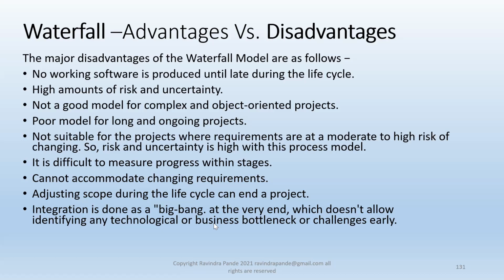Okay, for example, what type of projects use waterfall? As I discussed, wherever the requirements are fully final. Let's say you are developing a product, a new smartphone. The requirements, if they are finalized, you have already decided the strategy in terms of screen resolution, Android versions, the chipset, the speakers, and so on. Then it's fine to go with waterfall.